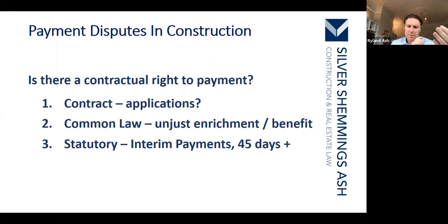You might have an order or order acknowledgement that's then issued. Ultimately, the rules are that it's the last document, the last shot principle as it's known, which will apply before the contract is created. And a contract can be created or accepted, terms can be accepted by conduct alone.